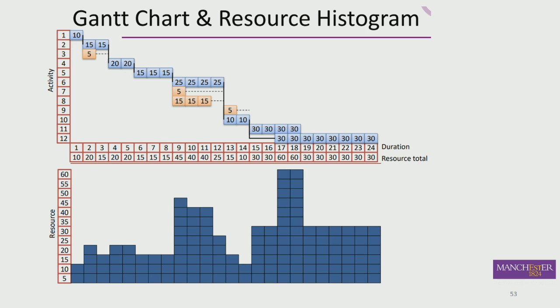Now, in the process industries, every year they shut down oil rigs, pharmaceutical plants, petrochemical. They shut down their facility at INEOS and places like that in Scotland. They shut down for a week, 2 weeks, and they go through a shutdown and turnaround period where they just inspect everything for any faults. It's called a shutdown and turnaround project.